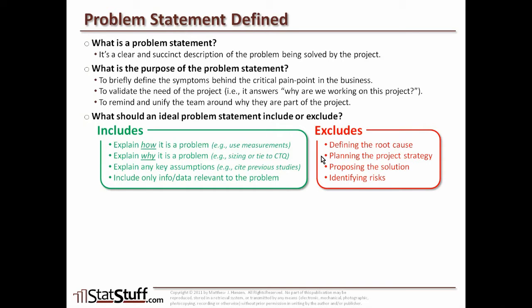Also, exclude any project strategy — how you're going to attack the problem, what steps you're going to take in trying to solve it. Make sure you don't include that in the problem statement. I usually like to address those as a separate strategy or by laying out my plan for how I'm going to attack the problem. That should not be a part of the problem statement definition itself.